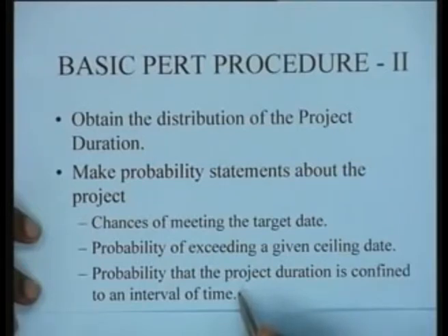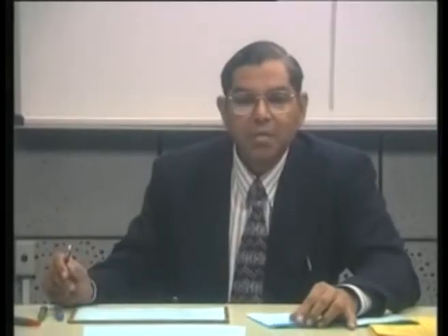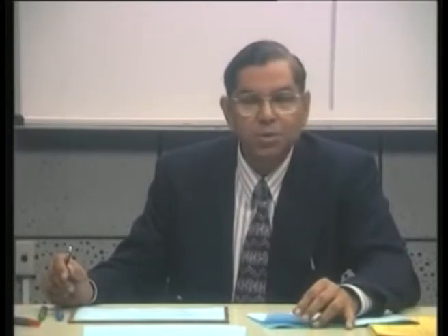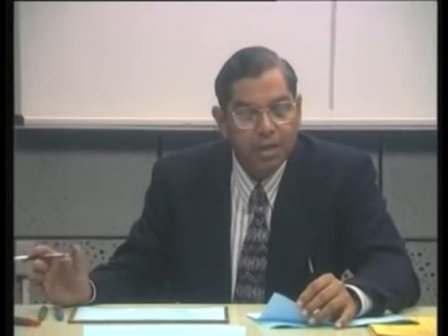If you were interested in answering this question, you could answer these questions very exactly by making appropriate probability statements from the distribution of the project duration. So this is essentially the basic use of PERT. We are able to capture the uncertainties in the environment, incorporate those uncertainties into the modeling process and make firm estimates of how long the project is likely to take, what are the probabilities that it is likely to be delayed, and so on.